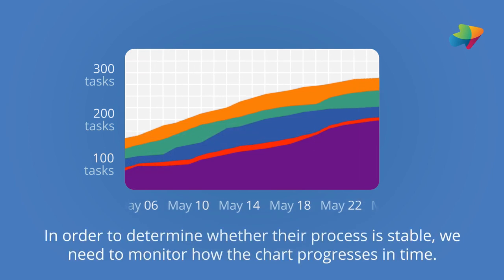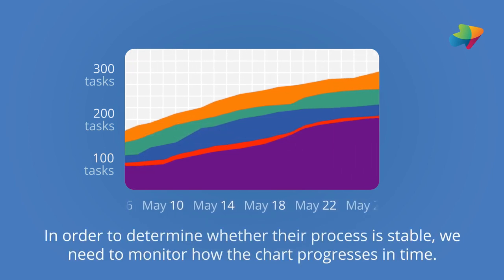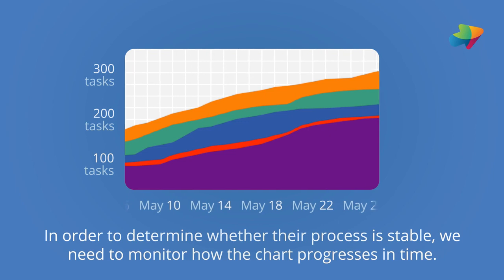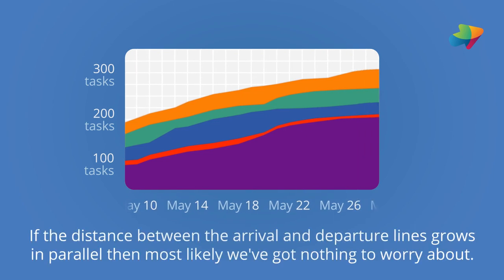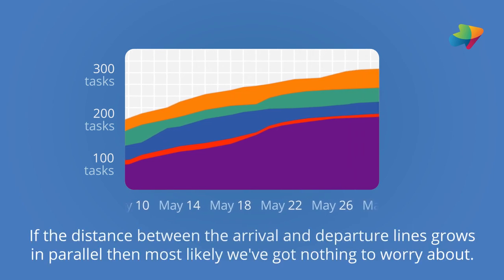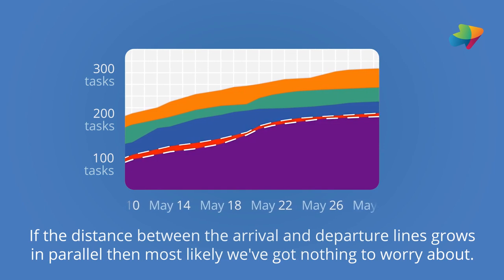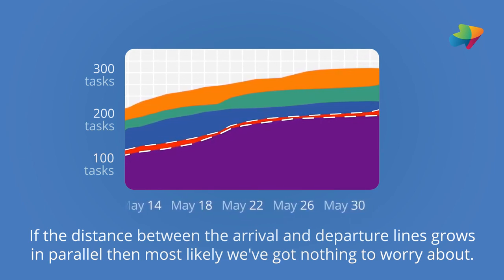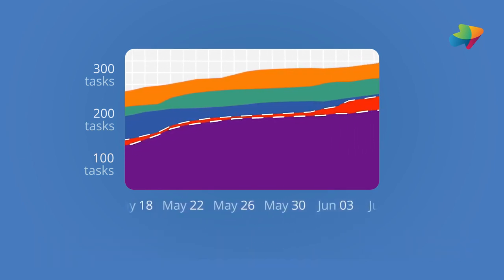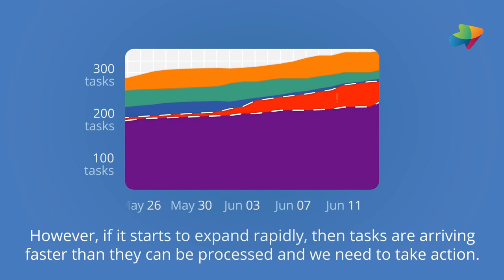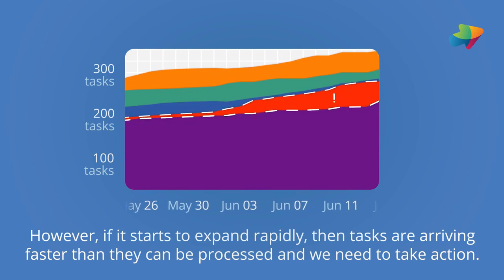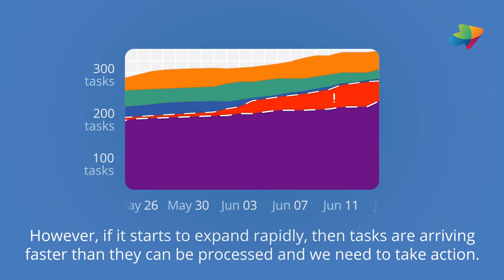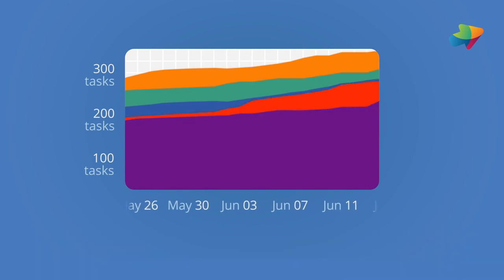In order to determine whether their process is stable, we need to monitor how the chart progresses in time. If the distance between the arrival and departure lines grows in parallel, then most likely we've got nothing to worry about. However, if it starts to expand rapidly, then tasks are arriving faster than they can be processed, and we need to take action.